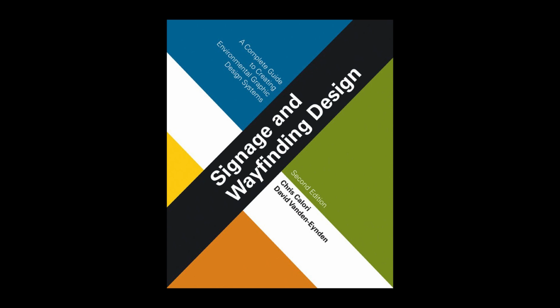On paper submittals such as shop drawings and graphic artworks, the drawings are typically marked up with review comments in red pencil, hence the terms markups and red lines for reviewed drawings. On some projects, other project team members, such as the architect, will mark up the drawings with comments additional to those of the EG designer. It is becoming more common for EG designers and architects to mark up electronic versions of the drawings rather than paper prints by using Adobe Acrobat Pro or a project collaboration application. Figure 2.32 shows a marked up shop drawing.